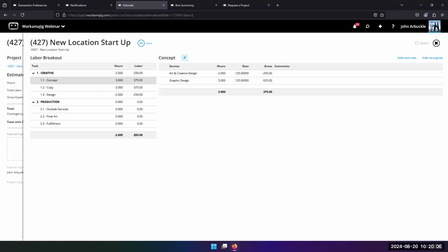So that's the difference, right? So again, why is it that you only have the one estimate? I get it. But again, you may rethink that and say, well, if we have a lot of changes, maybe we should allow the change orders so that we can just say, hey, can you sign off on these changes so I'm not having to sign off on the entire budget? Okay.